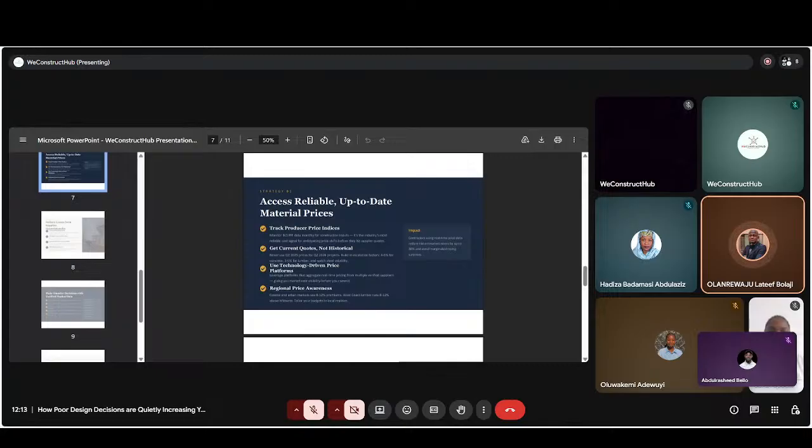If I'm dealing directly with an OEM, I'm rest assured that I'm buying quality materials. The OEM is able to provide me with documentation that I even need to seek approval to get. I need my data sheet. I need my material safety data sheets. I can easily get all of this from the OEM. So my first point of call is to work with an